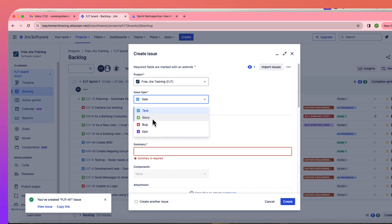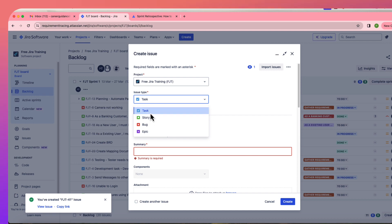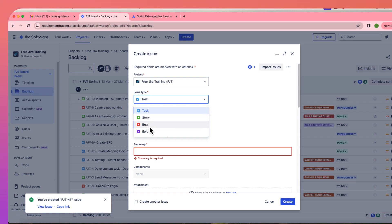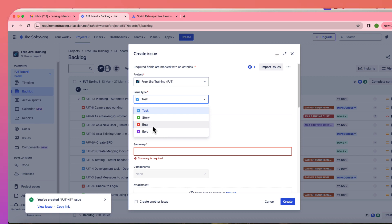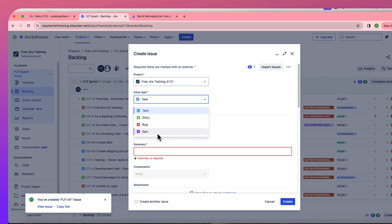The difference between a task and a story: a story is something that takes more than eight hours of work; a task can be finished within three to four hours. A bug is a defect found during testing. Epic is a higher-level requirement. These are the four different issue types in Agile methodology.